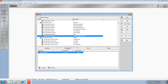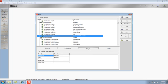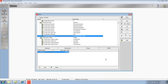The Resources tab, where I can assign resources to fill the role and identify for which resources this is their primary role. I can identify the price per unit and the limits, which enable me to evaluate the capacity I have to fill that role.